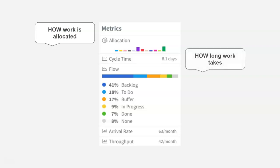The next one is your cycle time, which is how long does it take for a card to clear your board. So this is also the way to calculate your responsiveness. In this case, your team is delivering card, in average, in 8.1 days, which means just over a week.